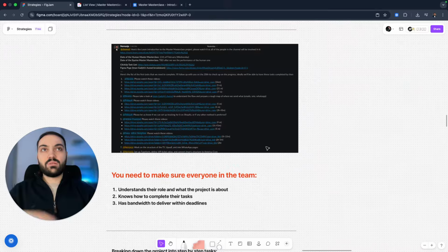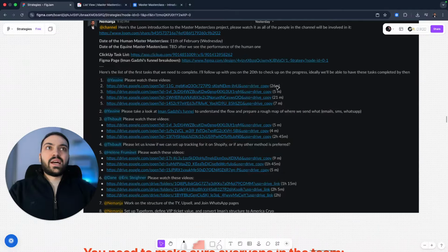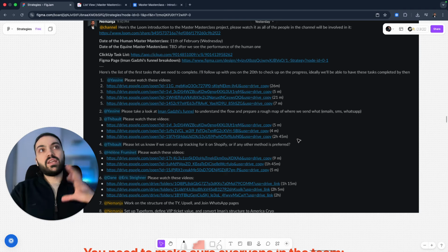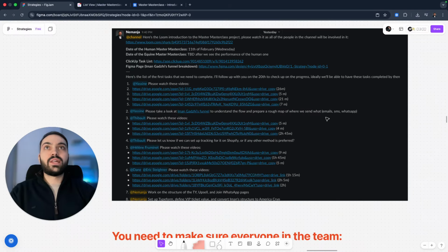And I'm going to explain that in a second, and that's exactly why I added this extra info on how much time do they need to do certain tasks. And that will make it easier for them to say, okay, I need 25 minutes for this. I'm going to dedicate 25 minutes right now, and then I'm going to maybe delay some of the future tasks for tomorrow or before the final deadline.